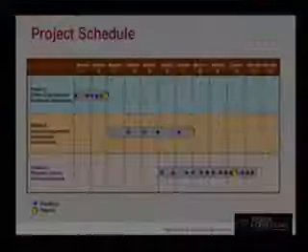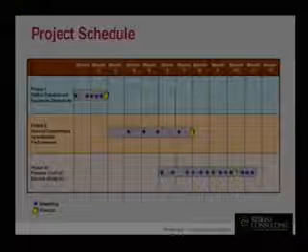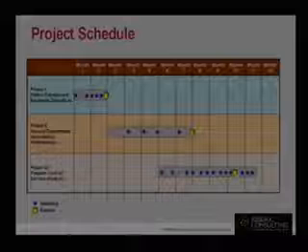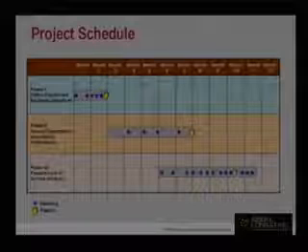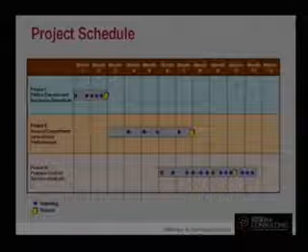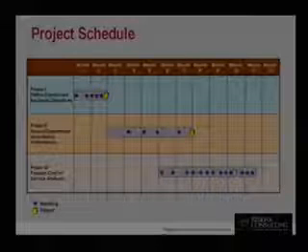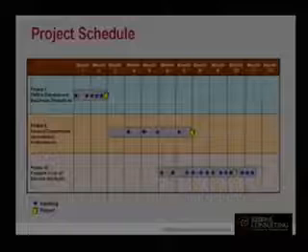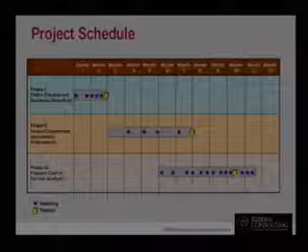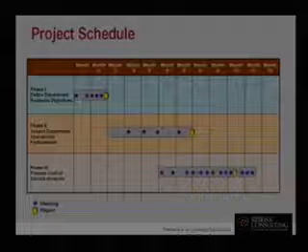This is our project schedule. As Sean mentioned, it is an approximate 12-month schedule, but we would anticipate somewhere along months 6 and 7 being back before council with the results of phases 1 and 2, as well as our preliminary financial plan, where we would talk about the adequacy of the existing revenue stream. So we fully expect to have this project wrapped up this calendar year and be back sometime in the mid to late summer to visit with council about the results of phases 1 and 2.